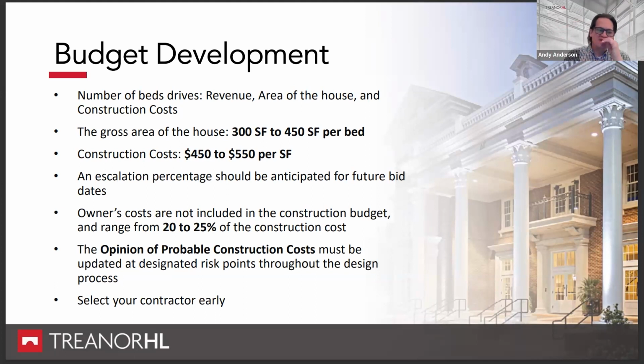And then the last point there is we think it is very important to select a qualified general contractor. And we have a lot of experience helping groups select those contractors, or pre-qualify a group of contractors, preferably ones who have done project types similar to this, or even better if they've done other Greek housing, because having a contractor on board, they're the only ones on the team that are really capable of getting real numbers and providing good estimates. So getting them on board early can help us confirm some of these preliminary budget numbers.